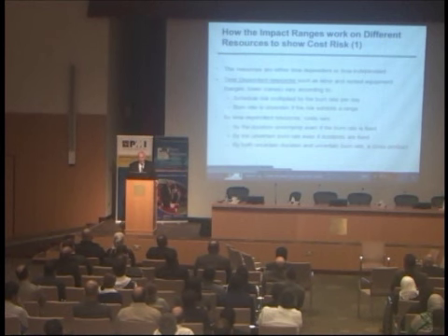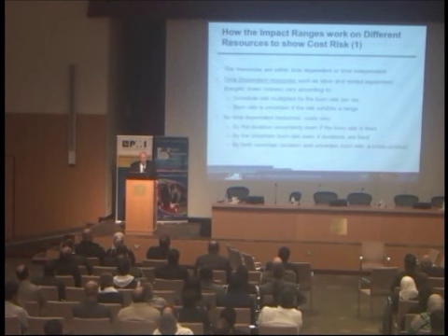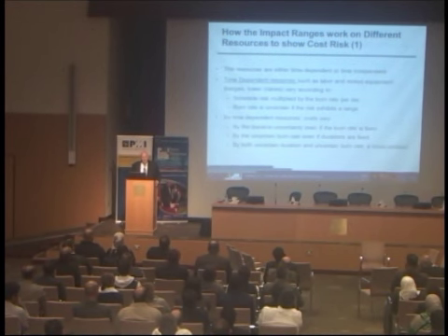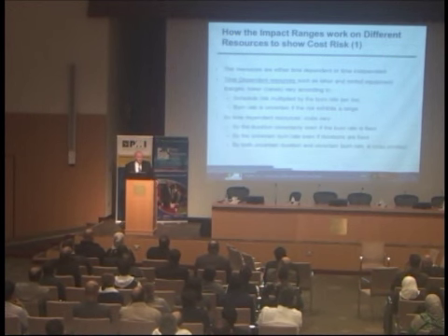I've got time-dependent resources such as labor and rented equipment. Time-dependent resource costs vary by the duration, the uncertainty in the duration, and the uncertainty in the burn rate. Now notice that we are doing cost risk analysis using the schedule as a platform. It's not the Excel spreadsheet, it's the schedule that is the platform.